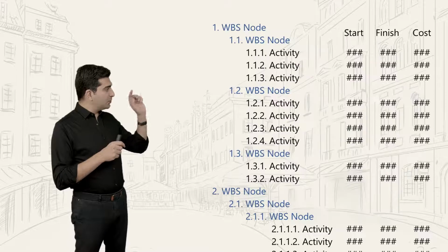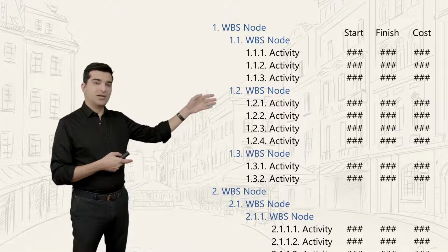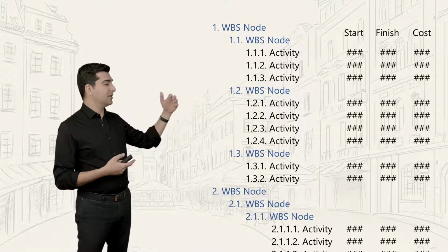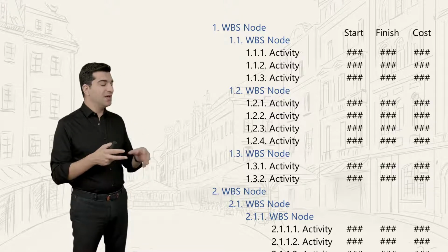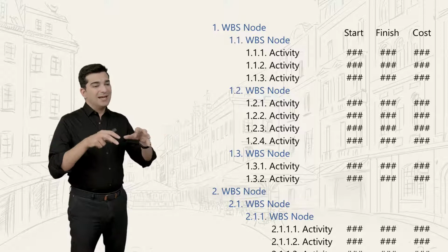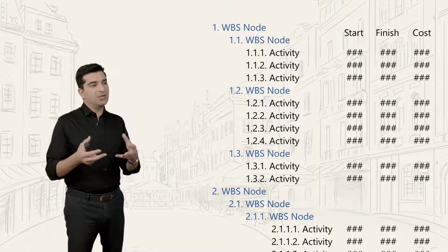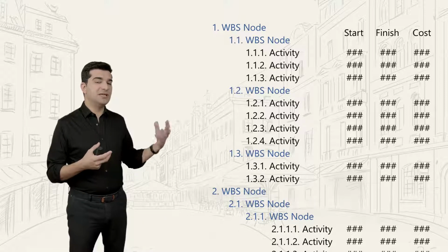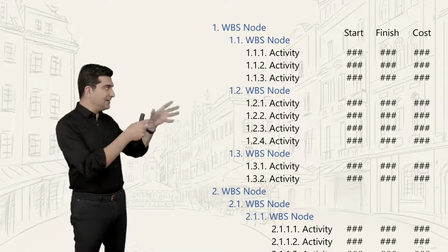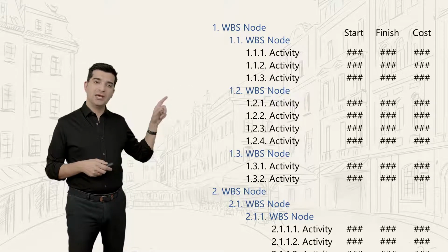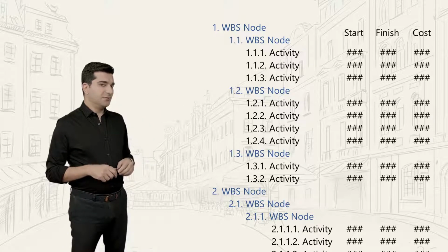Those things will go to your list here, so they will change the scope. They will have start and finish dates, that's time, and they will have some budgets. So everything that we need in practice will be reflected in these three. And the rest of the plans that we have for risk management work like the source of these practical things. They are not used directly, they are used to create these practical things. And that's why this is our performance baseline. Was it too abstract or was it okay?